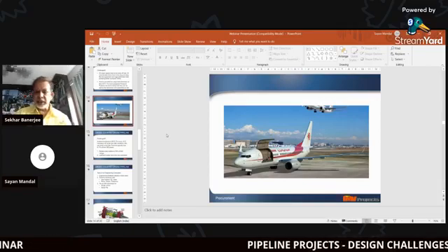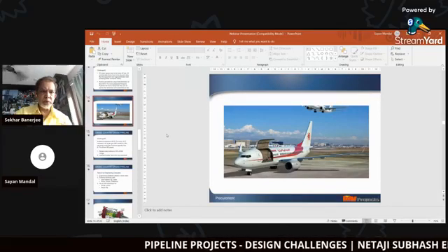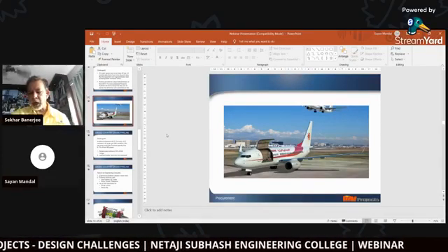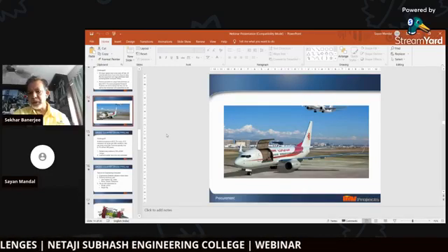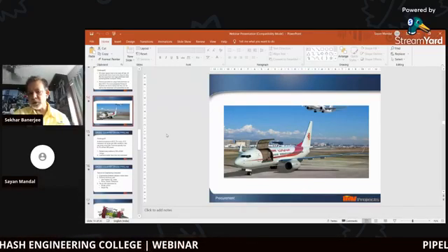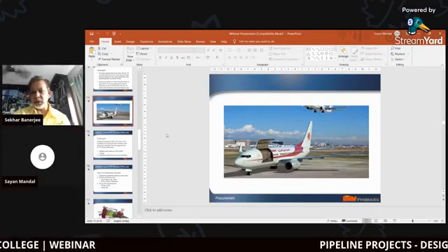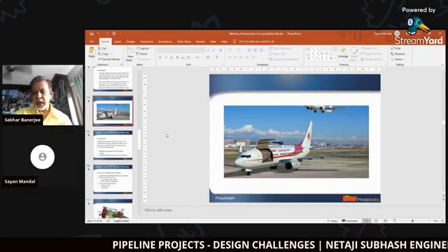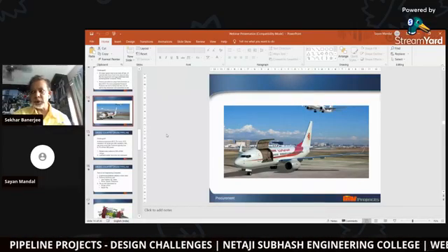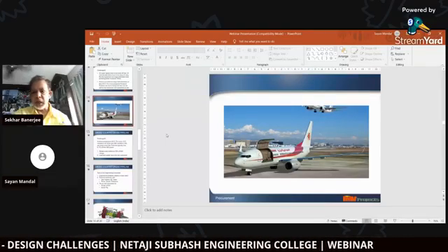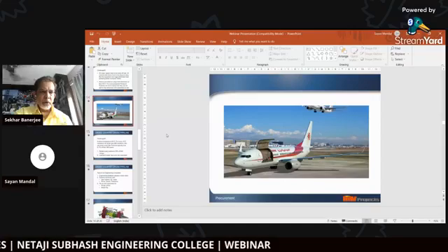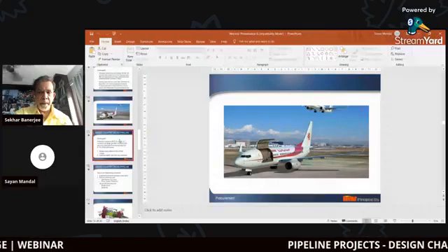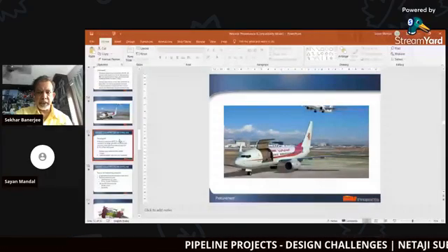So we laid a runway at the side of the pump house, and this cargo hold dimension was the key for us to select a pump and compressor. How those can be dismantled, up to what we have to dismantle it to load it to this plane. As a mechanical engineer, you have to really understand the components of big machines and how those can go out. Next slide, please. Next slide, Shan. Yeah.